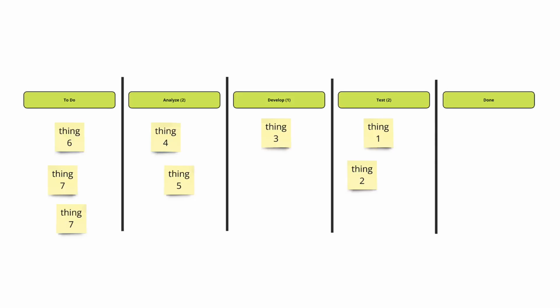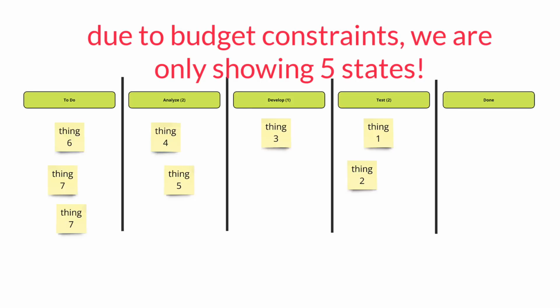So if you have a 12-step process to do some change onboarding thing or whatever that is, your Kanban board should have 12 states on it, because as you're moving work across, you're tracking how long each of the work tickets or things or features or items, whatever you want to call them, how long they're staying in each state. And then now you'll start to smooth out your process, and you're going to find states that maybe you don't need anymore, or states that you can optimize to maximize your flow through the Kanban system. But it should definitely reflect your existing workflow state.